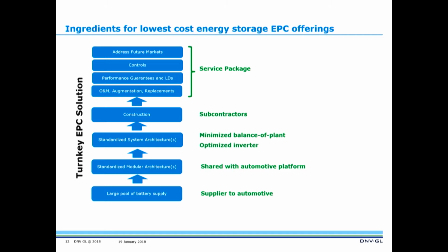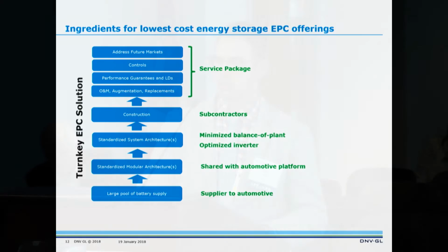Cost is also driven by how you integrate the projects and how you build the projects, and the trend in the market right now is having an engineering, procurement, and construction company, or EPC, come in and give a turnkey solution. They install the system, they design the system, they operate the system, they provide the operations and maintenance package, and those systems are lowest cost when that EPC has a very good integrated supply chain, whether they vertically own all of those things in their own vertical integration, or they have very strong supply agreements with suppliers.